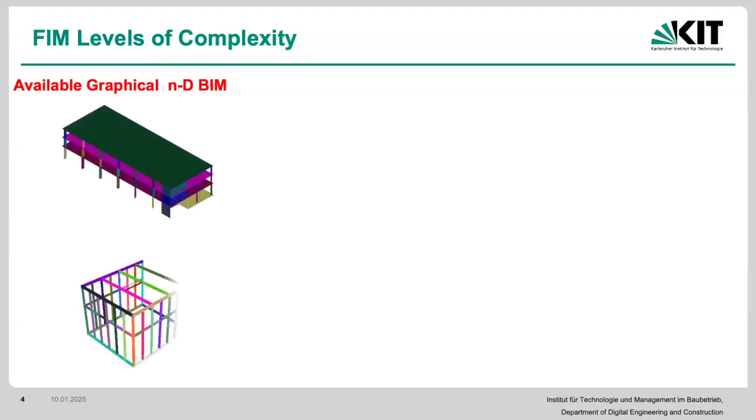So I give an example. If we have, let's say, a 3D model that is completely segregated, as an example, every element of this model, we know what it belongs to, what, let's say, characteristics and properties it has, and using that, we would be able to use that as a baseline information. If we have that baseline information, what do we do? We collect information from site, and then we compare it with that baseline information. If we have an accurate baseline information, we would be able to accurately simplify whatever data we collect, summarize it into the information that we want from the baseline, and then compare them together, right? But if we don't have accurate baseline, we would have no opportunity to be able to compare these together, right?